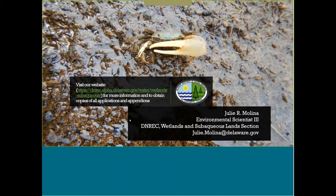always open to pre-application meetings, and then we also have the joint permit processing process where you can actually come to our office and explain the project in front of a few others that you would need your permit from, such as the representatives from the Corps. You'll have representatives from Division of Fish and Wildlife, Coastal Zone Management. So it's a good opportunity to take when you're proposing your project and designing it to see what permits would be needed from all the groups involved.